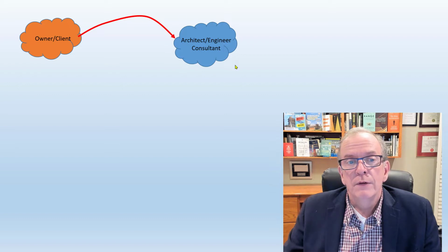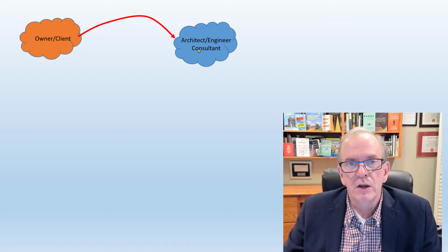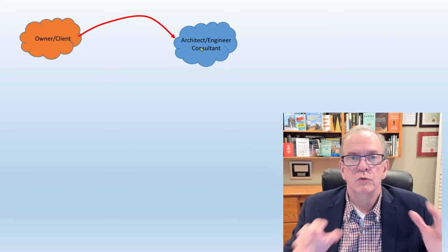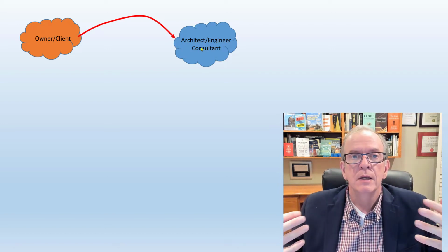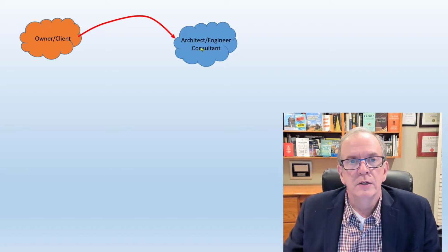As well, very often, especially in larger projects, the owner-client will have the consultant, the architectural firm, then oversee the work and ensure that what's been designed and what's been contracted is actually what's going to be delivered upon as well. And the architect engineering consultant will also put together the drawings, the specifications, and bid documents and invite qualified contractors to bid on the project.